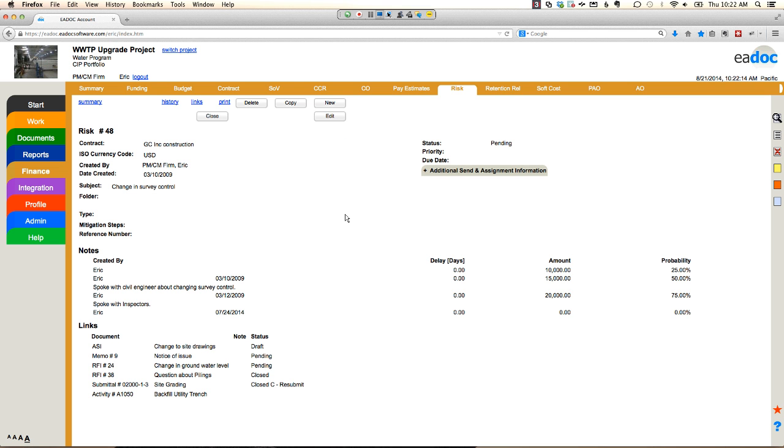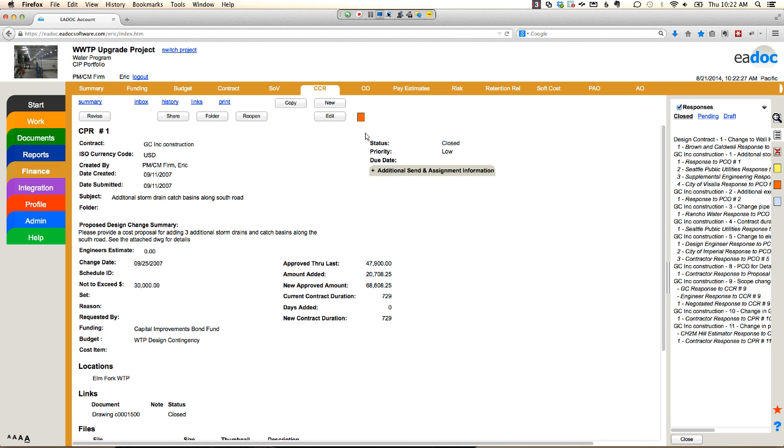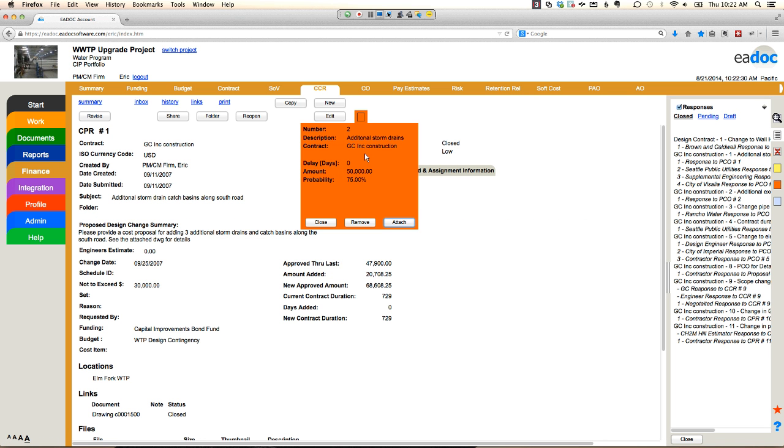Now with my risk items, there's typically going to be one of two outcomes. Either I'm going to mitigate that risk and close it out and resolve that potential risk on the project, or it's going to become a cost impact. Typically that cost impact is in the form of a change order, and I want to continue that relationship. So I want to take my risk item and tie it to that cost, because I want to track my forecast: what was I forecasting for the risk and the cost impact, and then what did it end up actually costing me on my project? How am I doing with my risk management? How am I doing with the risk tracking on the project in comparison to actuals? And so I can link those two together.